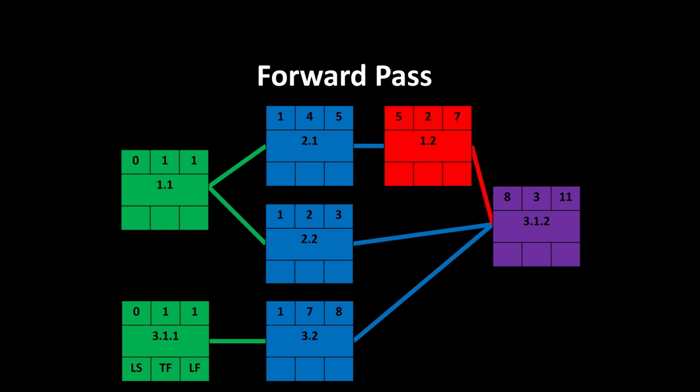If you've been through this process and your project sponsor or your line manager or your client is saying, I need this done in 5 days, you're going to be looking at this and saying, I cannot do it. It is not achievable with the times I need to do these activities. Something has to change. We either need to change the scope, which means removing some of these tasks to make the whole thing shorter, or we need to make some of these tasks much quicker to achieve, which probably means we need more money because we need more people so that we can do this faster.